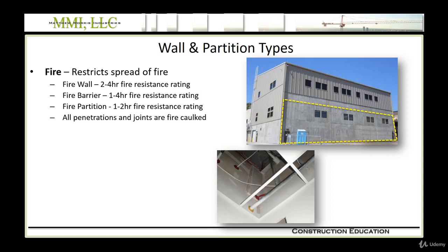And this is one of many inspections that needs to be performed before the ceiling is buttoned up, whether that's an acoustical ceiling or a hard lid drywall ceiling. It's particularly important with a drywall ceiling because it's hard to get back up there.